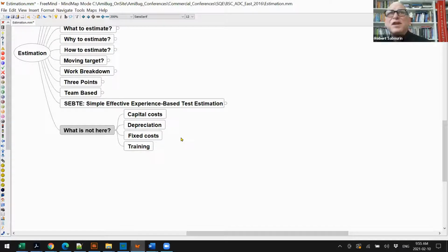But what's interesting is you got to force a discussion about what's in scope. Like if someone is changing the scope and they're saying you've got a fixed delivery date, that forces a discussion of what are we not going to test? And we have to deliberately decide what not to test. We're not going to skip things because we ran out of time. We're going to skip things because business is willing to take a risk in that area. So I really believe that we have to force the discussion of the scope and depth of testing, and always have different depths you can do.